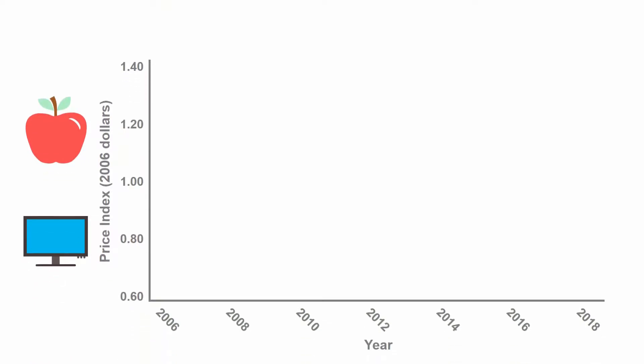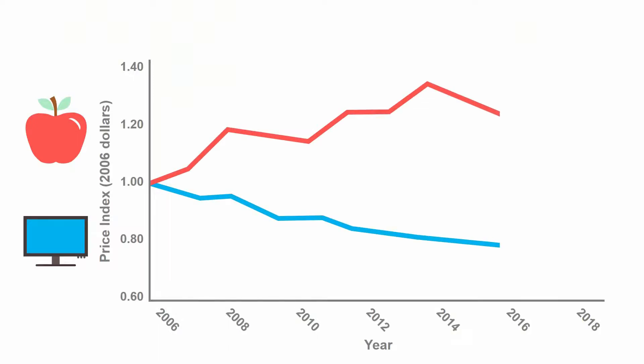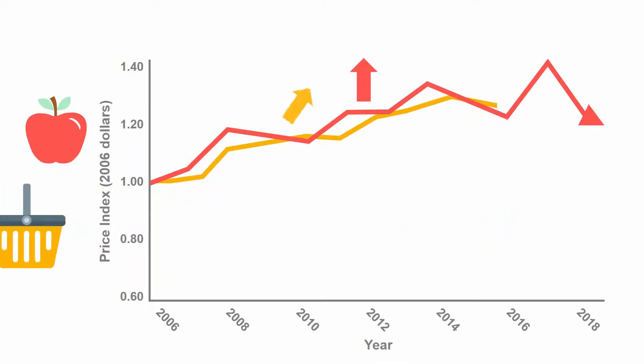However, when developing a realistic cost estimate, an analyst cannot just use any escalation rate to predict the price change for a product. Notice how the escalation rate for apples increases over time, while the escalation rate for computers decreases. Rather than use the escalation rate for computers to forecast the price change in apples, an analyst could use a proxy escalation rate, such as the rate for other fresh produce or the cost of apple-picking labor.